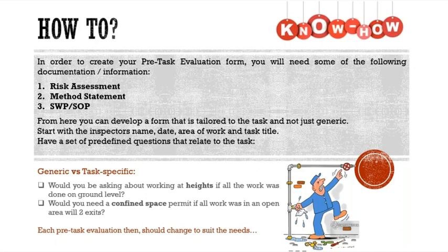You might be using a Stanley knife. So you need to have a safe working procedure on how to use a Stanley knife. If you are using a drill, and one of the steps is to drill into the wall to put a bracket on for a geyser, well, because you are operating a drill, you will need a safe operating procedure for that part. So you can see how all of these documents communicate together, and each part of the document will speak to each other, thus having a more effective system of mitigating the risks for everything that you do, touch, or area that you are in.